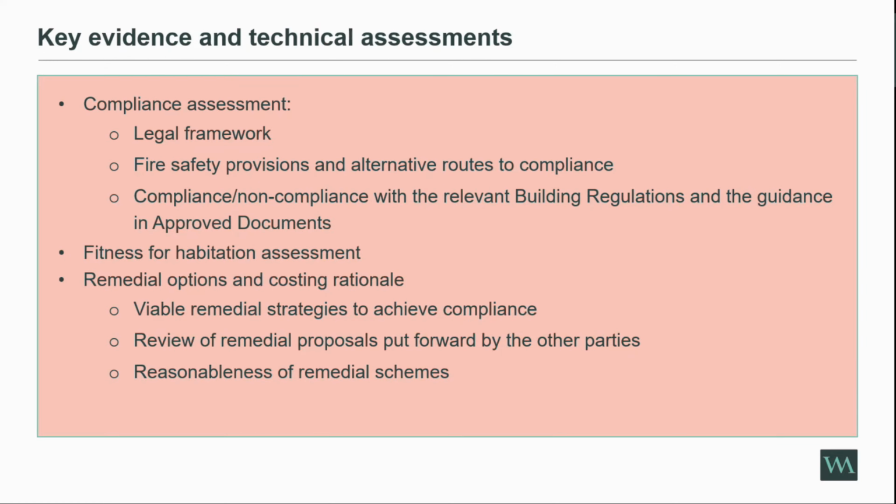So once you've undertaken these initial investigations, the next stage is analysing, and it's analysing in a way that we can understand. So firstly, looking at compliance. We need to understand, because as I've said, the DPA applies at the time of construction. So we need to understand what the legal framework was that was in place at the time of construction. So what were the applicable building regulations and the applicable approved documents that were in place at that time?